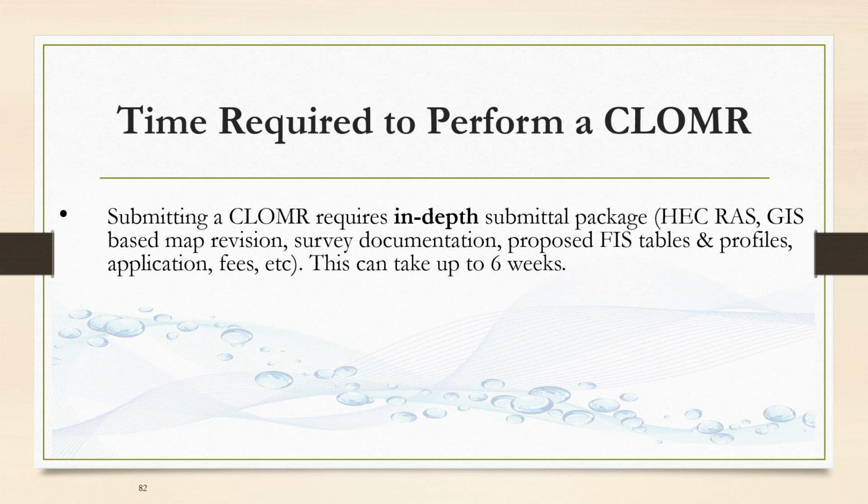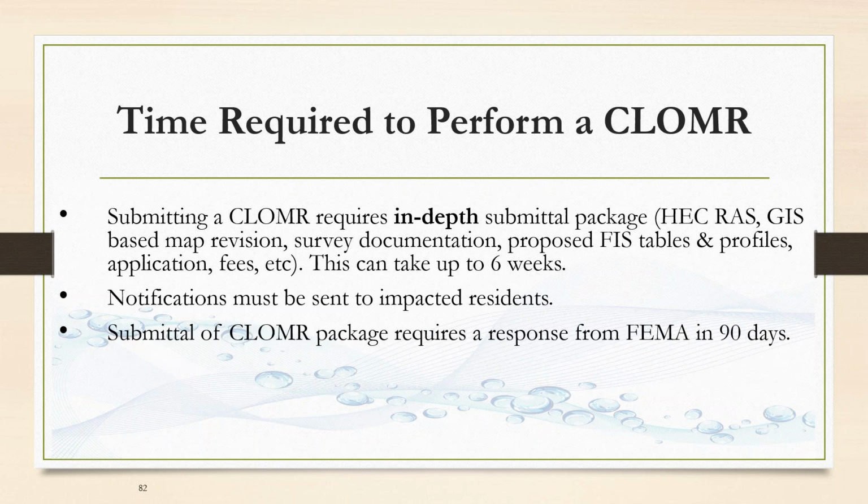So all at once you discover, it looks like we need a CLOMAR, then you get a project team involved. It can take about 6 weeks. It depends on the team. Some teams might take longer. You're not going to find many at all to take it shorter than that. Notifications have to be sent to impacted residents. Okay, so that's the other thing that has to happen. The people in the community are going to have to be contacted about what's going on there.